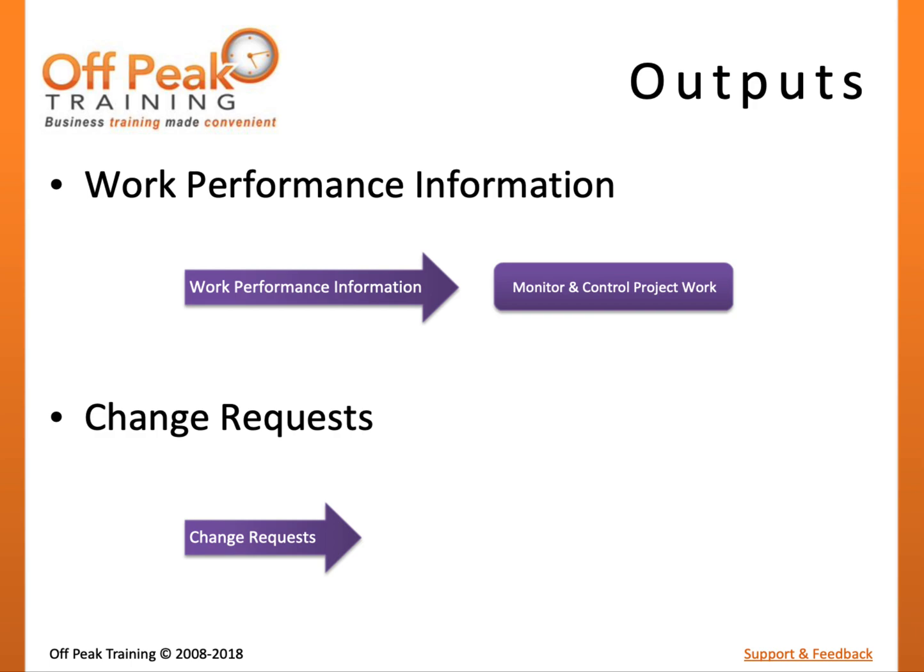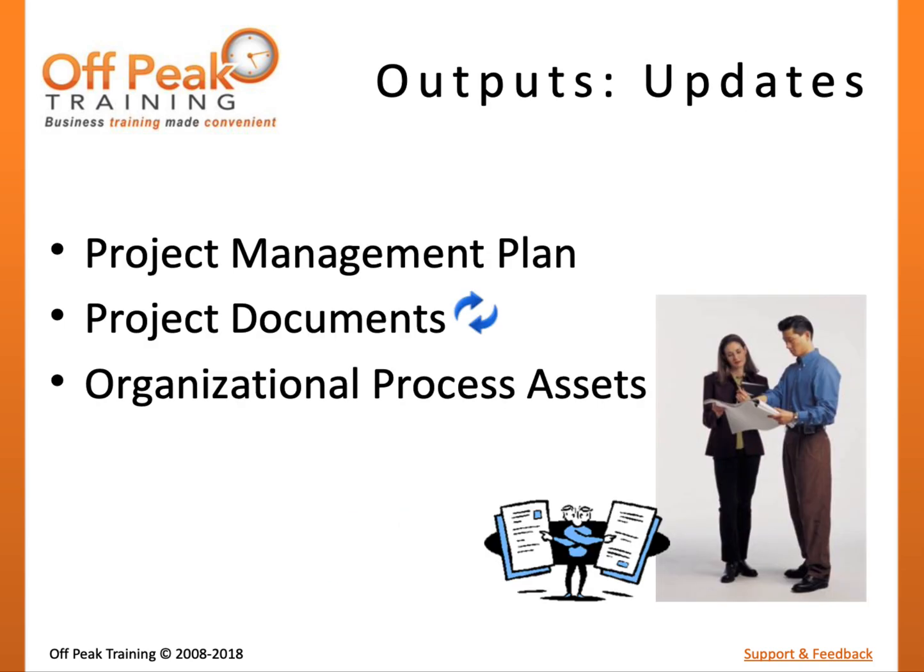Change requests may be issued by the project management team to help correct projects needing improvement or to prevent performance issues in the future. This may trigger an iteration of the planned stakeholder engagement and/or managed stakeholder engagement processes. The Monitor Stakeholder Engagement process may also create additional project documentation and updates. This may include updating the communications or stakeholder management plans, the issue log, or project records and lessons learned documentation.